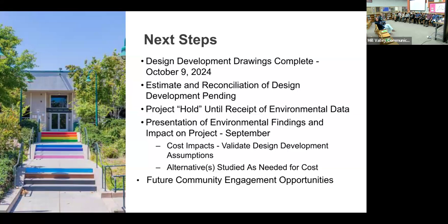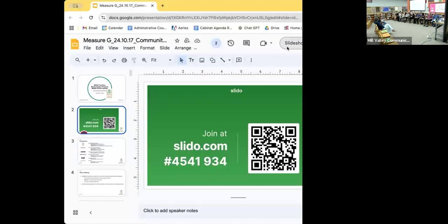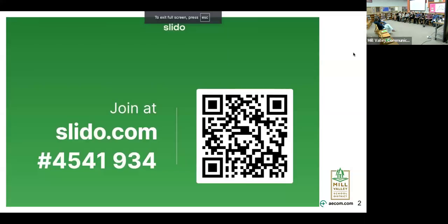Shall I read it again? Yes. Was the $130 million from board direction for total costs or just hard costs? Since I understand that with soft costs and only $7 million of mitigation for soil, we are already over 165 million. The $130 million are hard cost construction and included the mitigation costs.